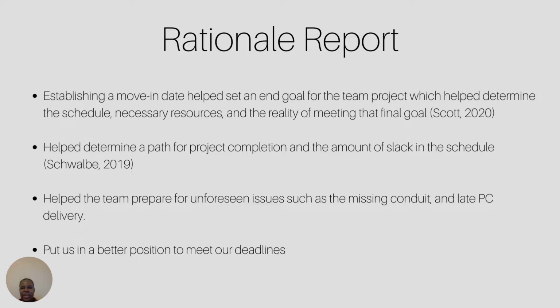This decision also helped us determine a path for project completion and gave us a better idea of how much slack we had in our schedule when it came to meeting our planned milestones. Having the move-in included in the schedule also helped us prepare for unforeseen problems, such as the missing conduit and the late PC delivery.